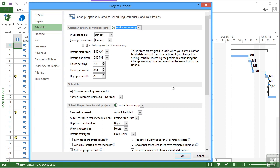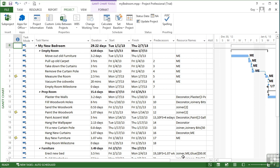And you can see the durations of our tasks have now gone up slightly. So it's 3.2 days to move out the old furniture rather than three, 2.13 to hang the wallpaper. Anything we entered as hours stays because we haven't said that an hour is less time, an hour is now 50 minutes.